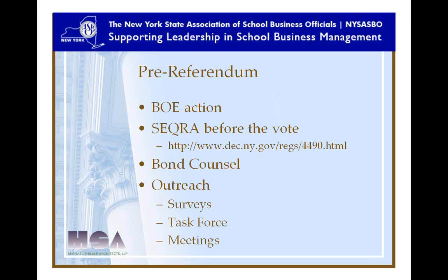And you'll have your board do a negative declaration, which is actually a positive thing, that there will be no environmental impact under SEQRA for your project. And certainly your consultants can help you put that together. As I said before, I think it's important to have some dialogues with your bond counsel, make sure that the resolution and what you're putting out to the community is clear, but give yourselves some flexibility to change your scope of work. And we'll talk a little bit about how your scope of work may have to change as you move further down the process.